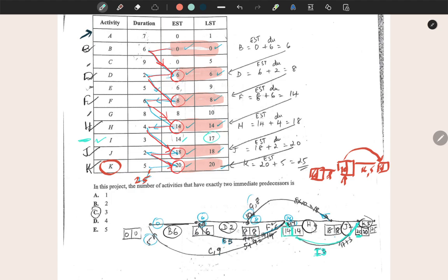The latest start time for activity G is 10 weeks. Its duration is 8. So if that activity had taken place starting from 10 weeks, it would have finished at 18 weeks. So look along the linear line, this is 18 weeks, and start the activity edge going backwards from there. But to what point shall we join that edge? The earliest start time for activity G is given as 8. So we take that edge back to where we see 8 in this box. And so that's completed.